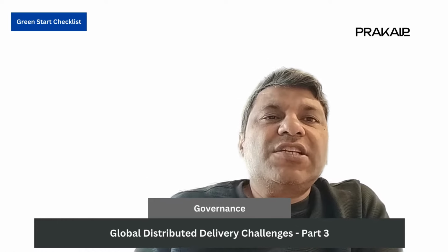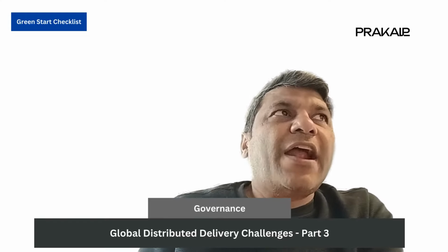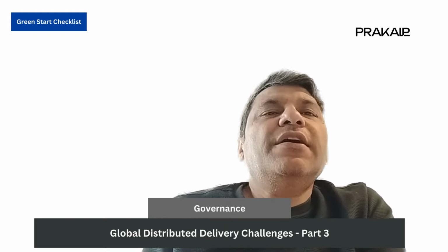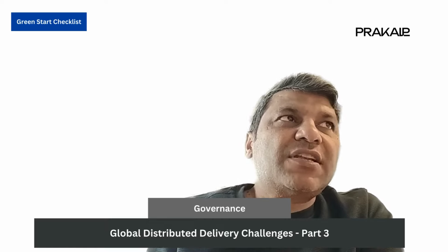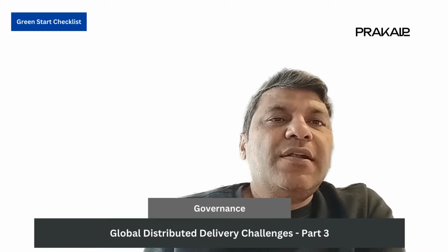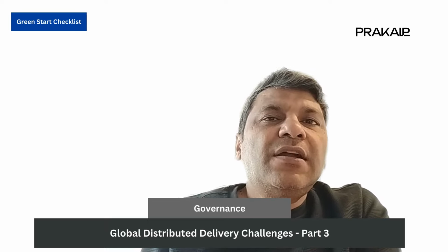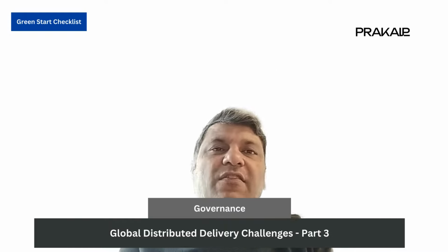A green start checklist is a series of items which will help you ensure that the right handover has happened from sales consulting to delivery, in terms of the SOW, master services agreement, understanding of the scope, understanding of estimation, and understanding of what assumptions were taken. That could be one area of the green start checklist.